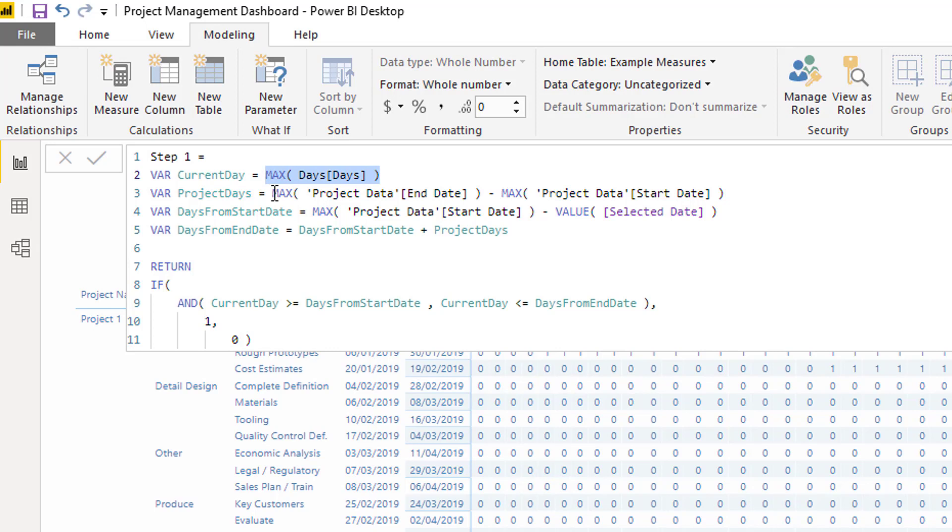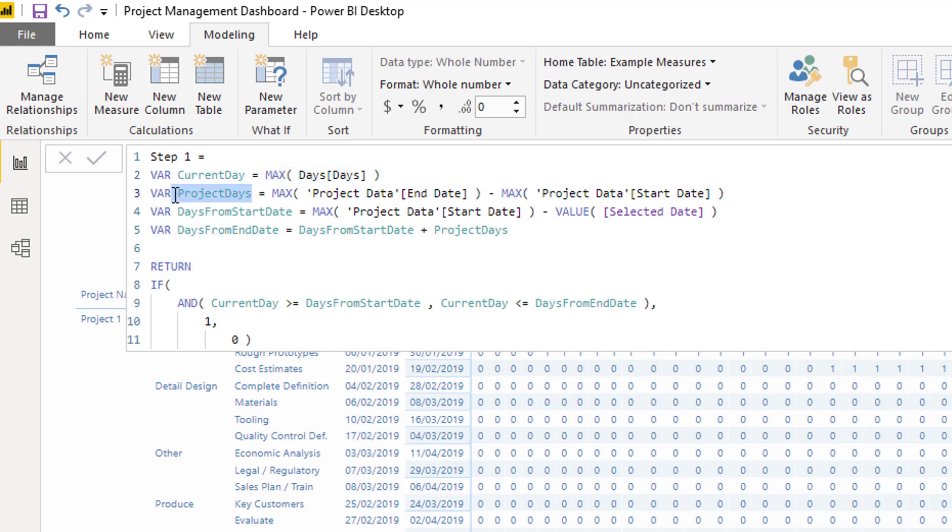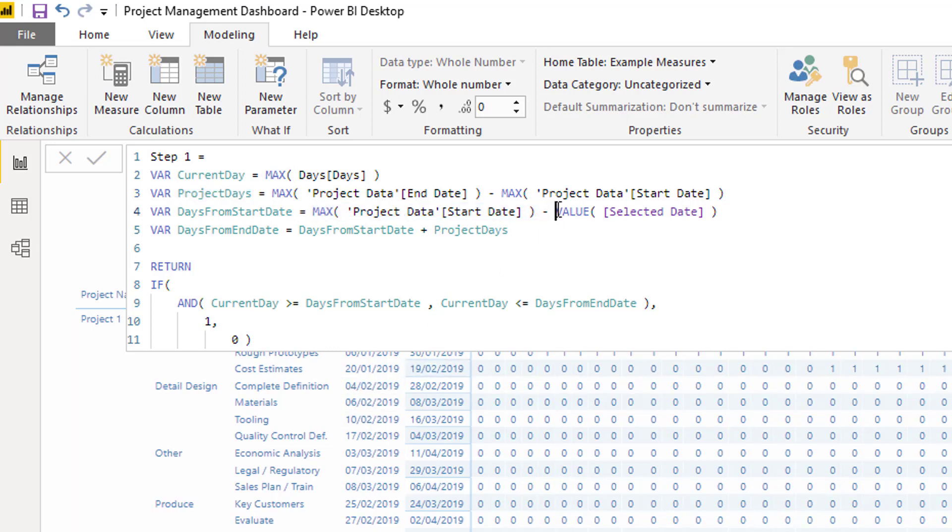Then I need to work out for every single row, what is the difference between the project end date and the start date? So basically my project days, that's what I'm working out here. In this one, I'm working out days from start date. I'm basically saying, how many days from my start date to the day that I have selected? That's the selected date in the slicer.